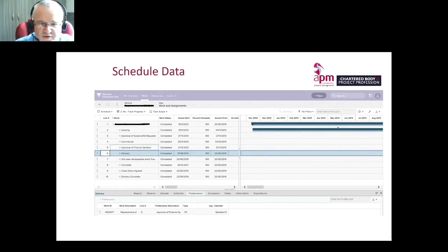So what you can also do is set up templates. So when you create a new task, you don't have to start by putting all the activities in. It will create a template then that the task manager can actually edit.